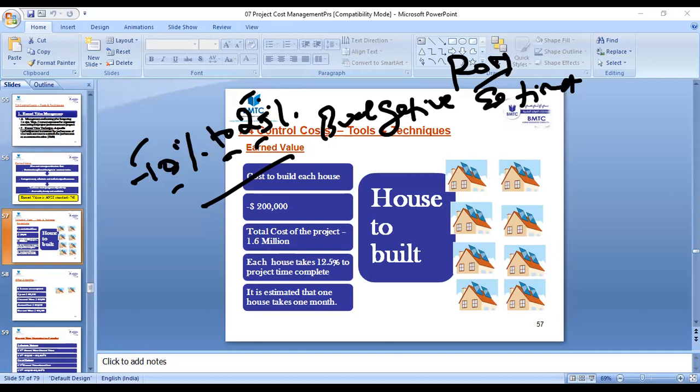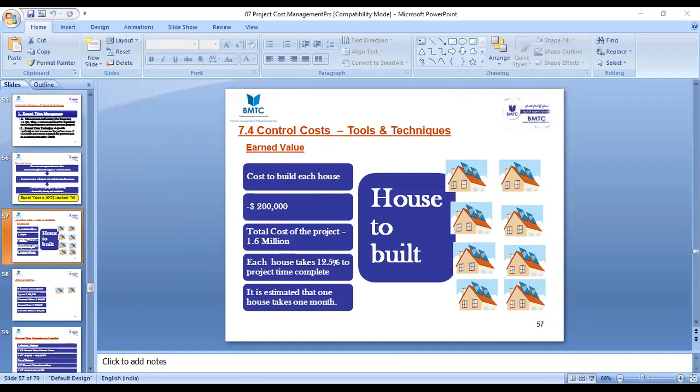If your true value is 100,000 for your project, and you use parametric or 3-point estimation, then you can make sure that you can complete your work for not less than $90,000 and it will not exceed more than $125,000. So you can see the vast difference, compared to 75,000 to 175,000. You're able to close the gap by using parametric and 3-point. Is it clear or not, guys? Still clear, right? Yes.